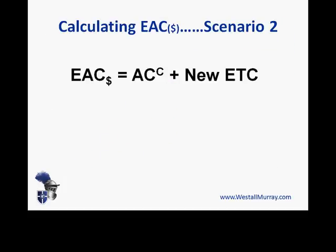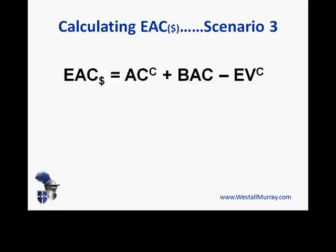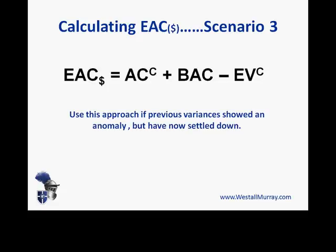A second scenario uses a separate formula in a circumstance where our estimates up until now have proven so bad — either optimistic or pessimistic — that we have no choice but to throw them away and come up with a new estimate for the remainder of the project, then add that to our cumulative actual costs. In other words, we're re-baselining the project. A third scenario applies when there's been a blip — some major anomaly, either higher or lower than expected expense — but everything has now settled down and we expect things to be smoother towards the end of the project. There's that formula shown on screen.